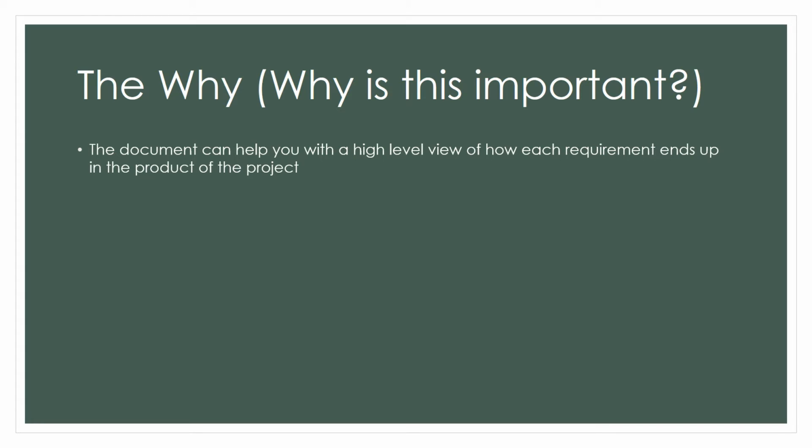So, talking about all the tools and techniques that we have already discussed, when you have used all of them and you have collected all the requirements, what is their journey, right, from the beginning to design, and then to coding, of course, and then to testing and then finally ending up in the product of the project? This entire journey is traced by the requirements traceability metrics. So whatever requirements you had, how did they end up in the product of the project? That is a high level view which an RTM document can provide.